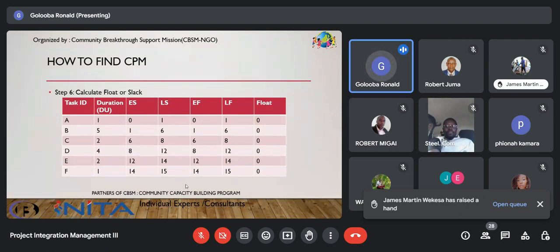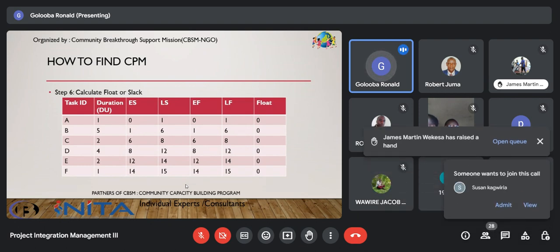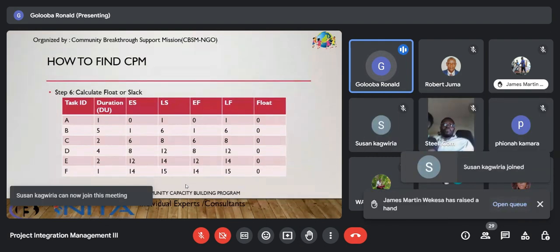If you are to have the list of the content that you're going to have within the blog, then that should happen within day 1, so that you are able to also start writing the draft and then move forward until you post. And this means that since all the float is 0, there's no flexibility in this schedule. This schedule must be followed to the dot.